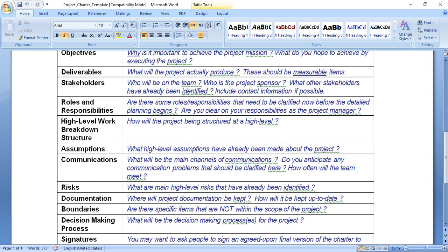This means number one, sole source or amend contract. One vendor will be selected for the project without the use of an RFP if the vendor is already under contract with the organization. The contract will be amended to include this project. Number two, the RFP, request for bidding, or competitive bid.